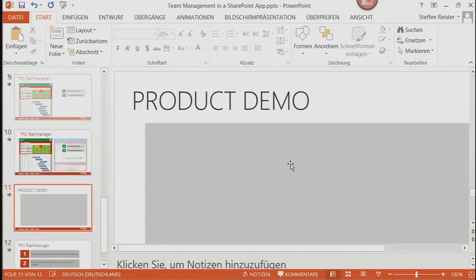So if the project manager changes things in his project plan, the first step for him would be to go into his team manager app in his project site to see whether he has some red lights. Then he publishes his project, which then brings these red lights also over to the team manager, and they then will start a discussion around that. Okay? That's the idea. So basically, behind all these tools, you need to define a process for how to deal with resource